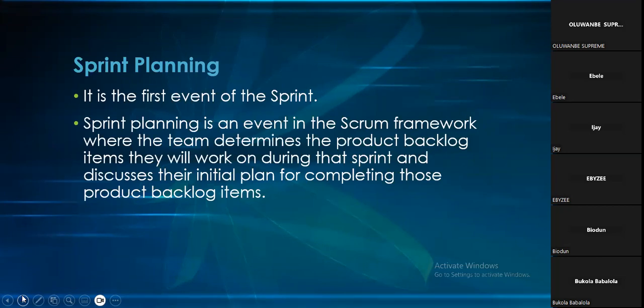The moment we select those things, the PO approves, we agree as a team that we can work on this. We have checked that all the stories meet INVEST criteria. We have checked all we need to do. We have met probably the definition of ready, we've stated out the definition of done. We have thought it's good to go. Then we take it into the sprint. The moment those 4 things from the 20 things have been agreed upon by the team that we are ready to go, then it changes automatically to sprint backlog. So you see that we brought the sprint backlog from the product backlog.